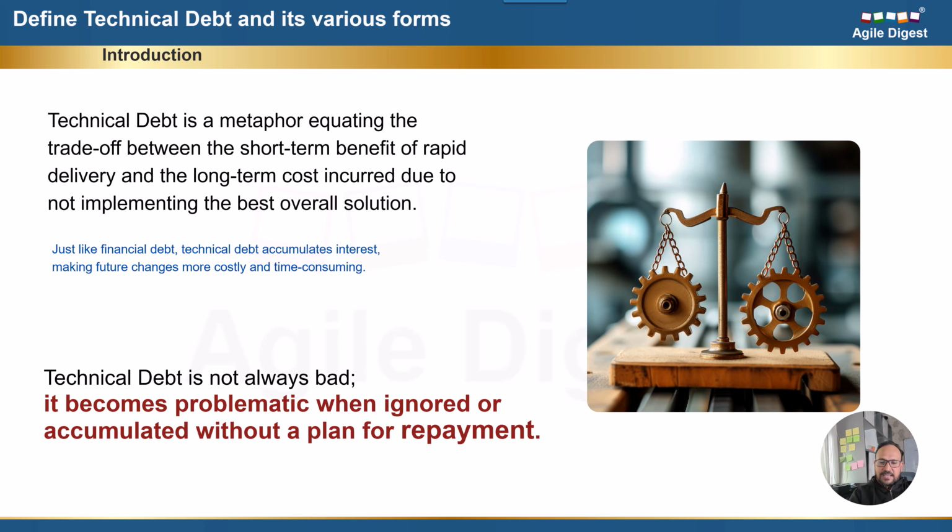You can conduct a thorough impact analysis and uncover which aspects of technical debt hinder your project functionality or your team's productivity. Once you identify them, you do a risk assessment, which further refines your focus, allowing you to address debt that threatens your system stability and security before it becomes a critical issue.